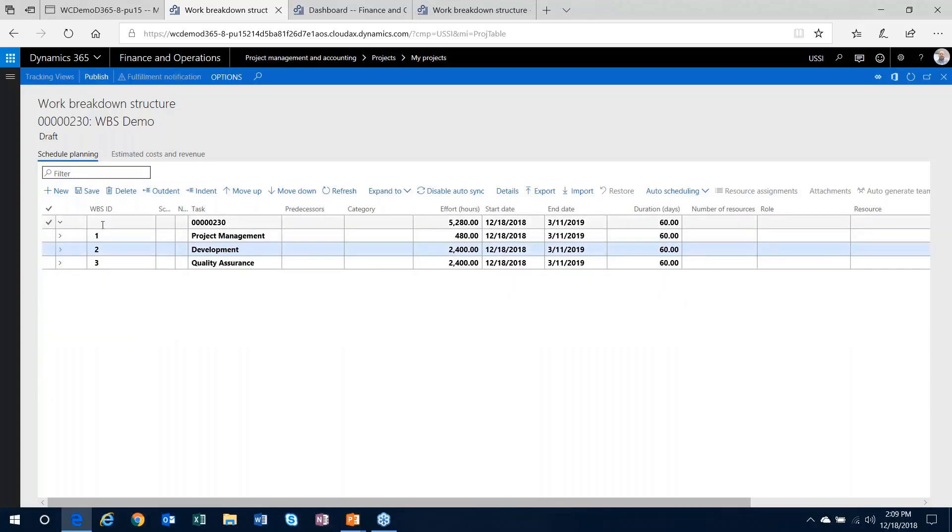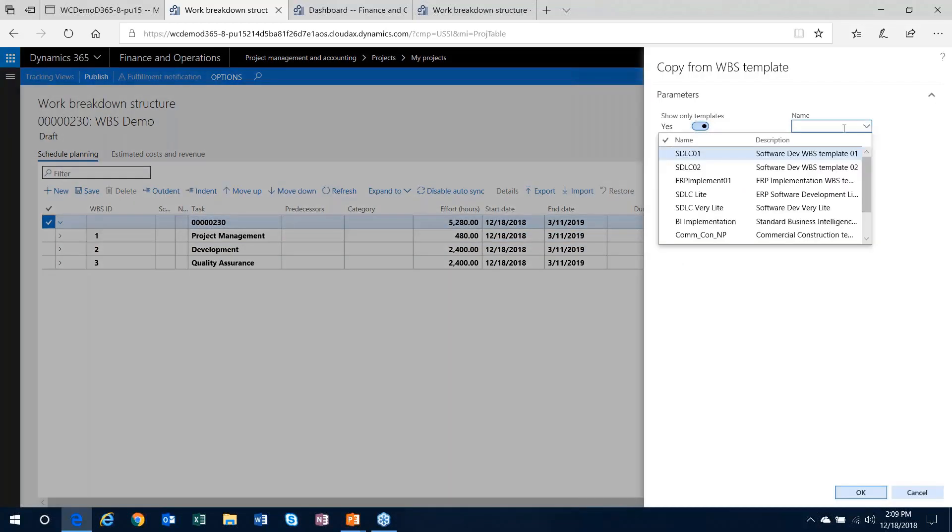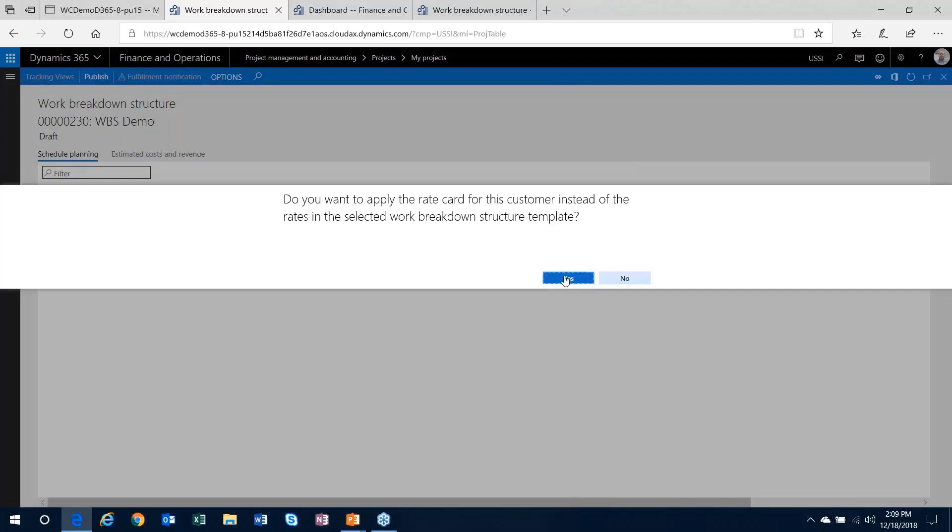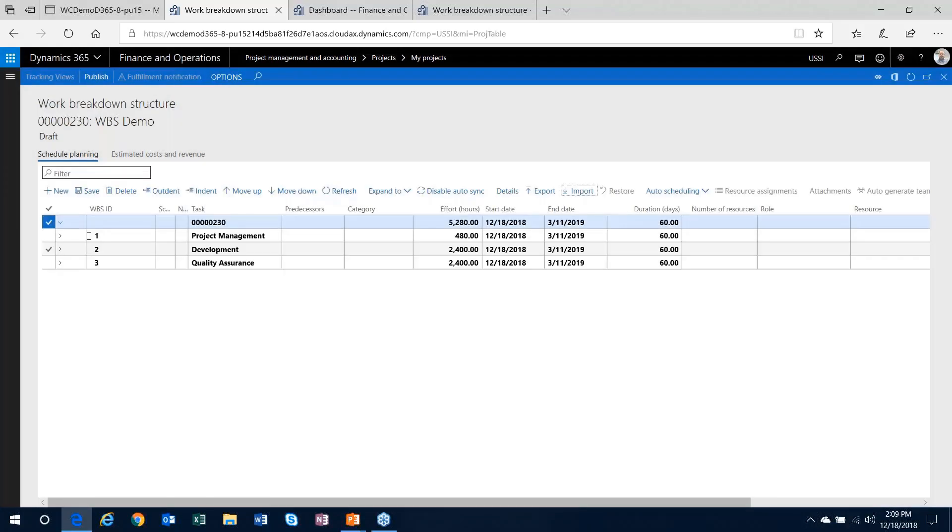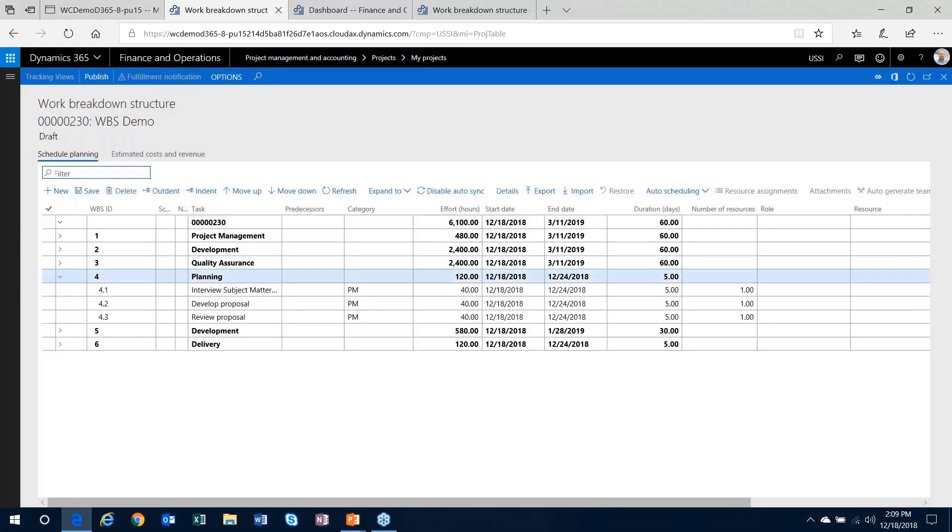What you can also do with a template is import more than one. If your business is structured in such a way that you can pick and choose from work breakdown structures and say, hey, I need to do a little bit of this and a little bit of that, I can select the second template and it'll basically append it underneath the task that I've got selected. Templates are very functional with regards to being able to just quickly get a work breakdown structure up and running in the system.